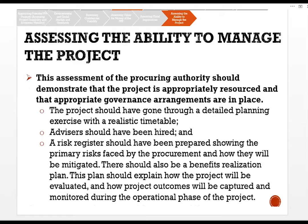The assessment of the procuring authority should demonstrate that the project is appropriately resourced and that appropriate governance arrangements are in place. The project should have gone through a detailed planning exercise with a realistic timetable. Advisors should have been hired, and a risk register should have been prepared showing the primary risks faced by the procurement and how they will be mitigated. There should also be a benefits realization plan explaining how the project will be evaluated and how project outcomes will be captured and monitored during the operational phase.